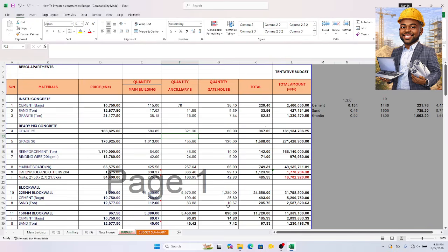If you're putting 30% profit and overhead on your general civil works, concrete, reinforcement, formwork and block, you will not put the same 30% on your specialist work. You put maybe 15%. Some even put 10% so that they can be very competitive, or 20%, as the case may be. So basically, these are what you need to prepare your budget. Now, your general civil work, your specialist work, and then your profit and labor is what we are dealing with here.